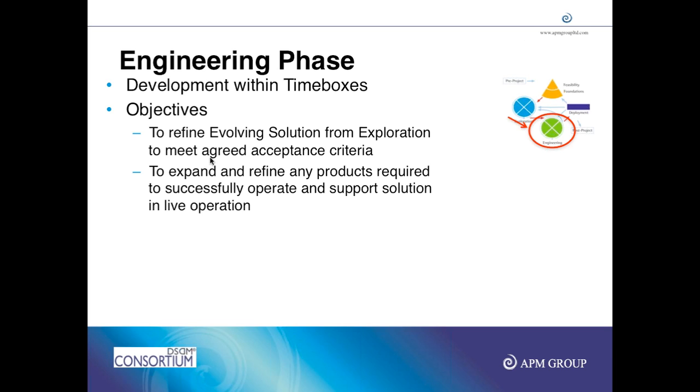Once we understand the functional and non-functional requirement, we create a quick prototype to show them how it is going to look like. And then in each iteration, we start developing more details to that prototype. And at the end of each iteration, we go back to the user, get feedback, and then build the next thing. So actually, we are doing analysis, design, development, testing, unit testing, formal technical reviews, and also developing release notes and production deployment notes as part of exploration and engineering phase.